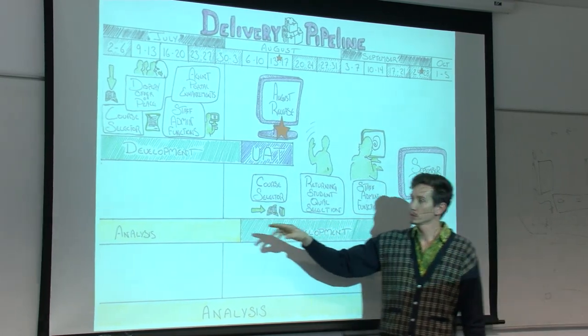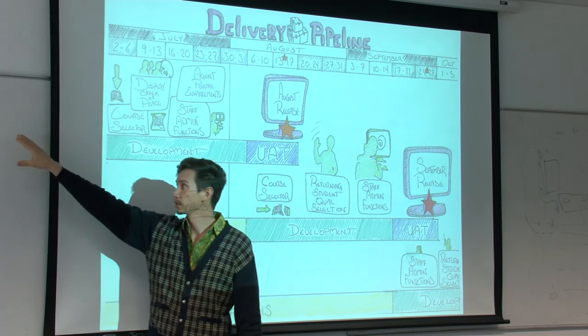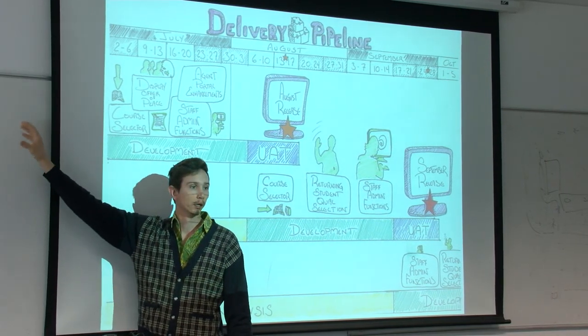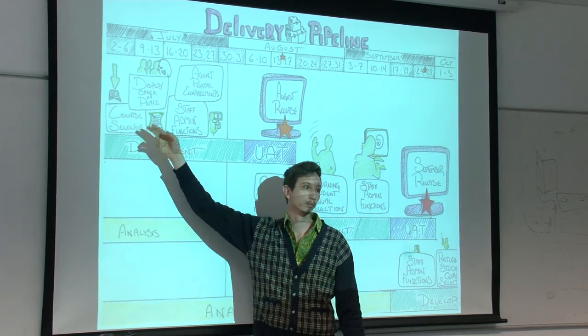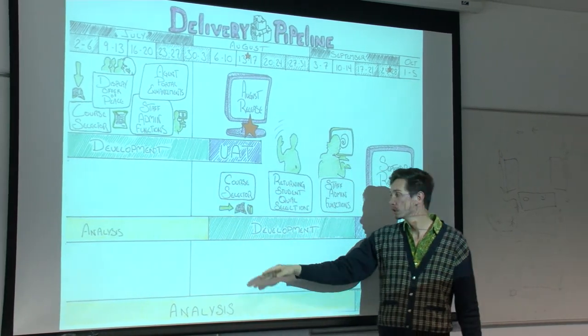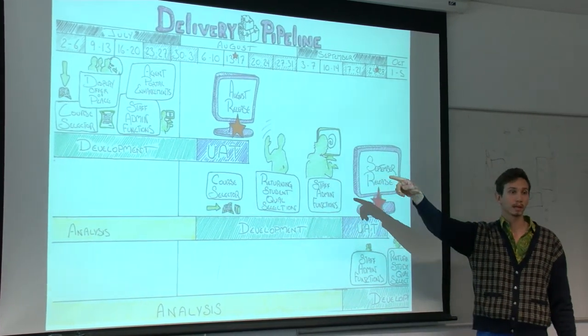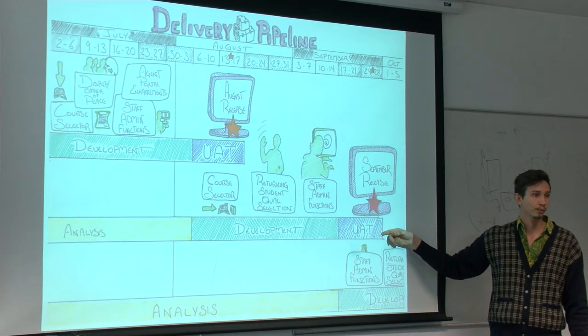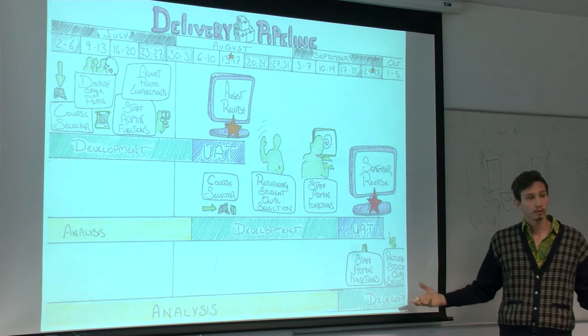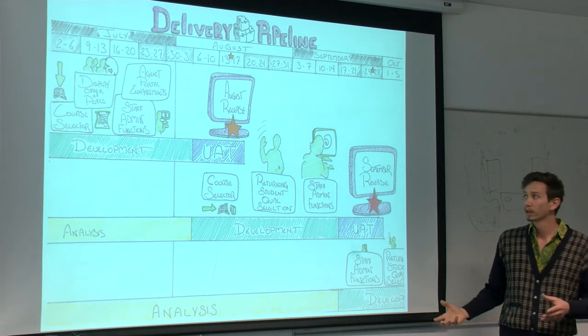If there was a delay in the analysis for the course selector back here, say in June, and it affects the course selector that we know is going to be broken into two parts, then actually what's happening back there delays our release near October. So that just helps give you a little bit more of a picture of the way we work.